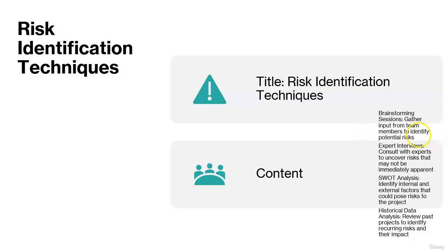Next is expert interviews. Consult with experts to gain insights into potential risks that may not be apparent from within the project team. SWOT analysis. Use the tool to identify internal and external factors that could pose risk to the project. Historical data analysis. Review past projects to identify recurring risks and understand how they were managed.